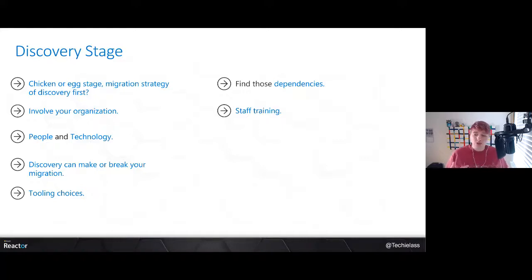Unfortunately, I've had a customer who kept the discovery, kept the involvement all internally in the IT department, and then they went out to their stakeholder and their change management board to get it approved, and someone said, oh, that application you're talking about there, or that workload, is actually going to be decommissioned. We're no longer needing it and we're replacing it with something new. So the plan had to be scrapped and redone again. So often there's decisions happening outside of the IT department that can influence what's happening for your migration as well. So definitely include everybody in your organisation somehow in order to gather all of that information.